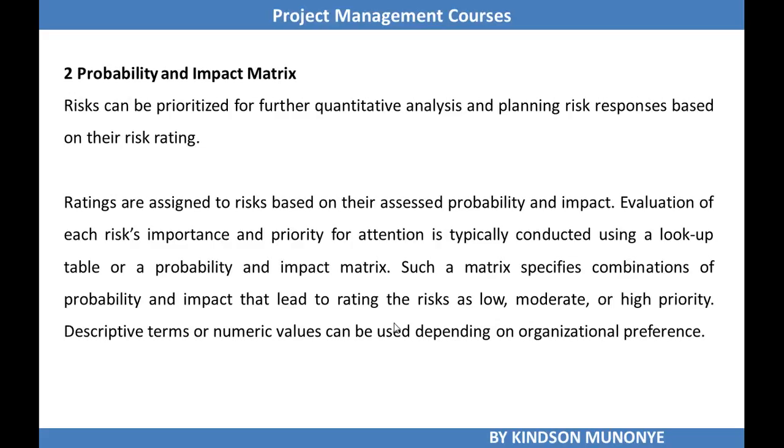Also take note that a risk is assigned a risk score. And how do we get this risk score? It's a combination of the risk probability and its impact. The combination of them provides a risk score.